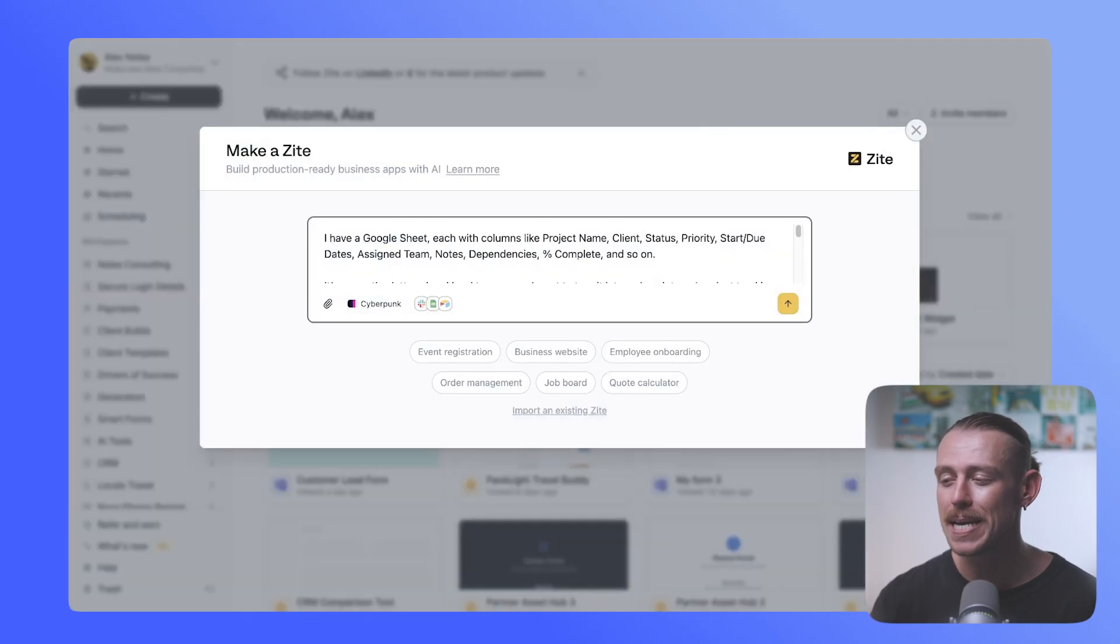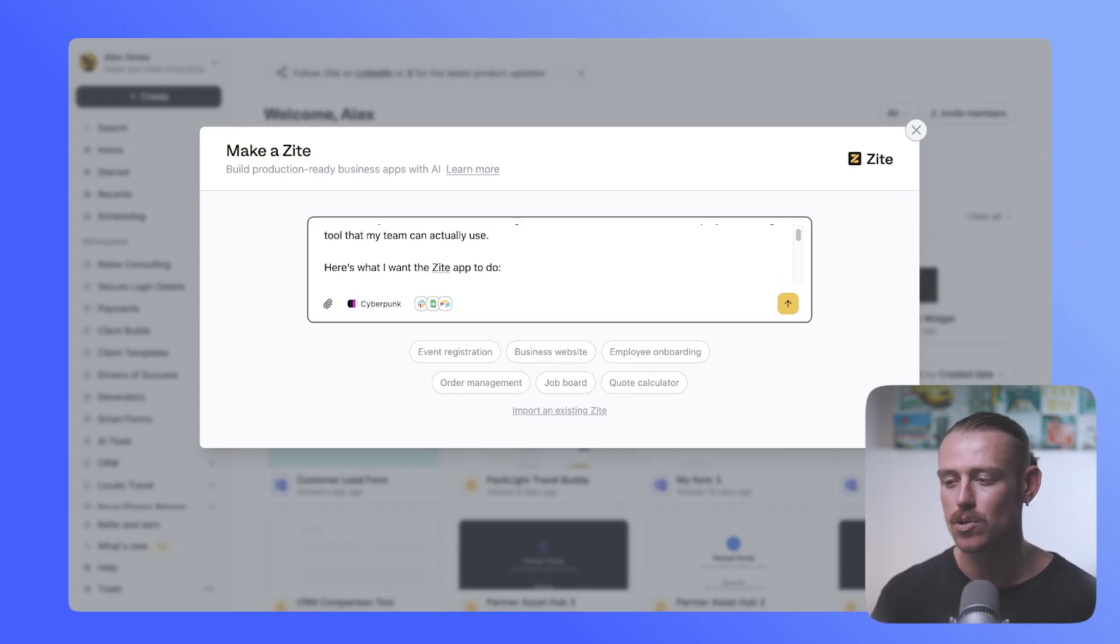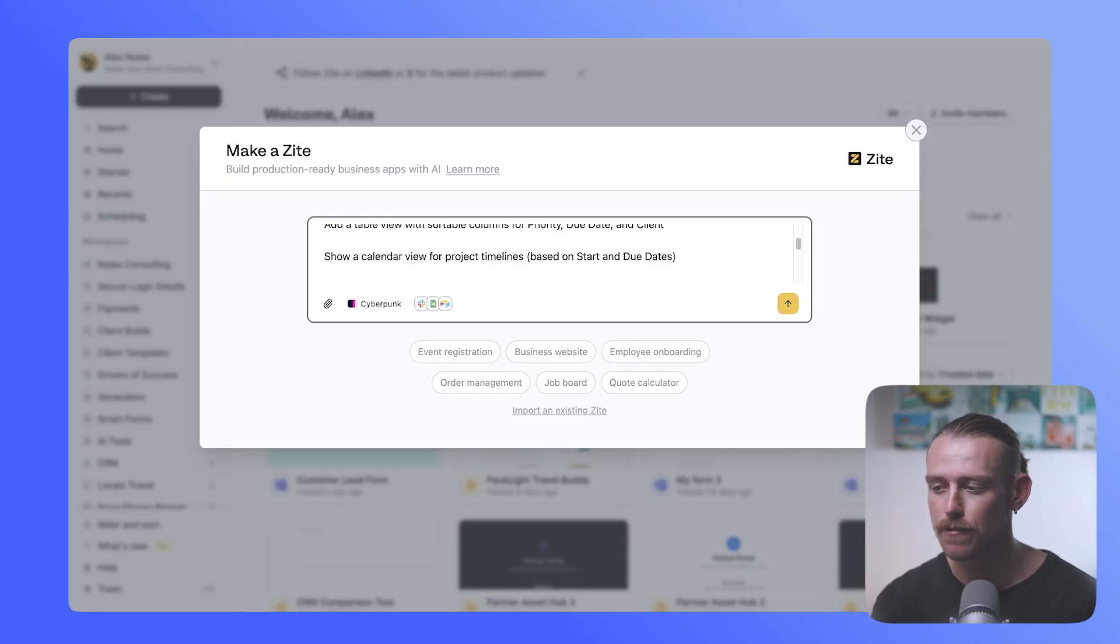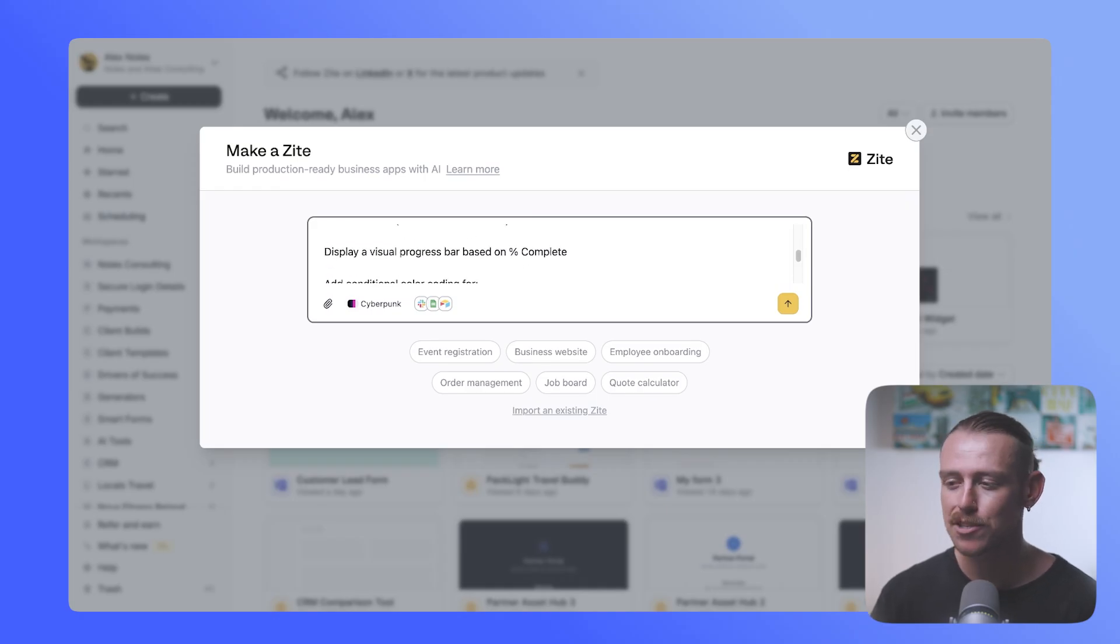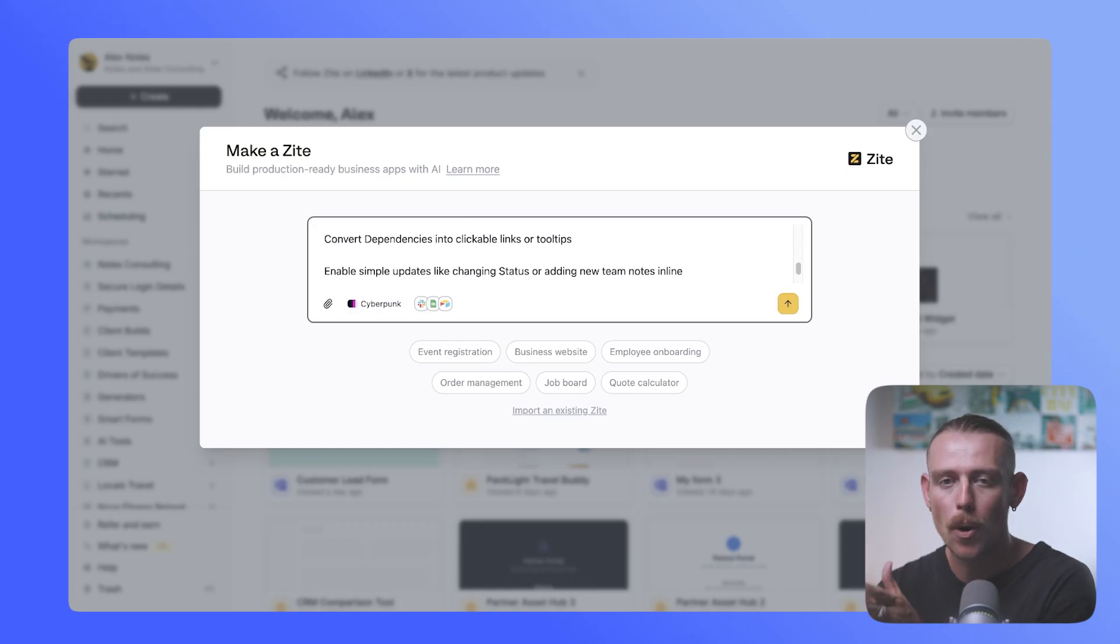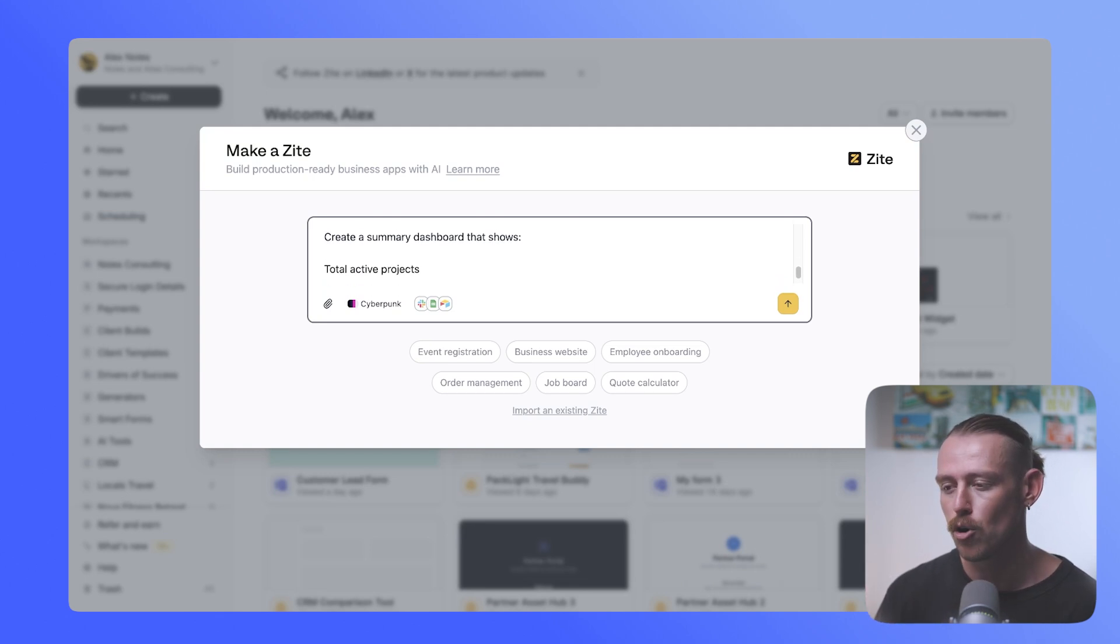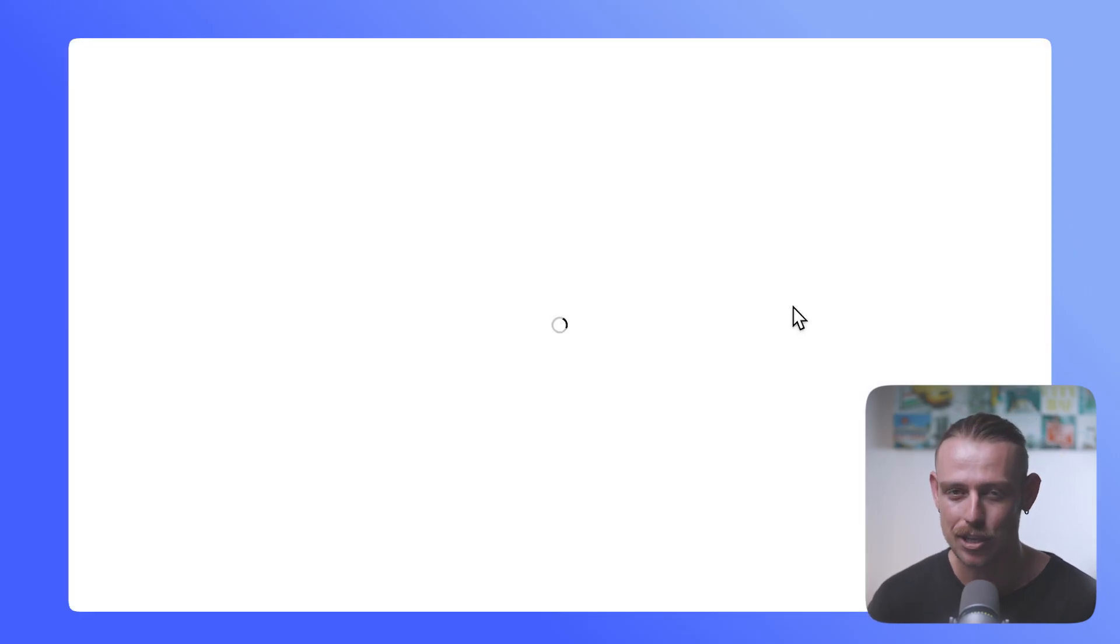Let's get this prompt going. So I've written, I have a Google sheet with columns like project name, client status, and so on. It's currently cluttered and hard to manage. We're telling it the problem. I want to turn it into a clean internal project tracking tool that my team can actually use. Here's what I want Zite to do. Layout and structure: Show all projects in Kanban view, grouped by status. Add a table view. I've also asked it to show a calendar view for project timelines. The functionality, this is super important here. I want to allow team members to filter by their name or the assignee, high or urgent priorities, overdue tasks, display a visual progress bar based on a percentage completed, and add conditional color coding for urgent tasks, overdue projects, and so on and so forth. I've also got a bonus section there that allows it to convert dependencies, enable simple updates like changing status or adding new team notes. That's pretty simple, but we want to ensure it does that. Create a summary dashboard, total active projects. We've also got number of overdue tasks, time logged versus estimated, and I'm pretty happy with that. You could go deeper, but let's see what Zite is going to generate for us.